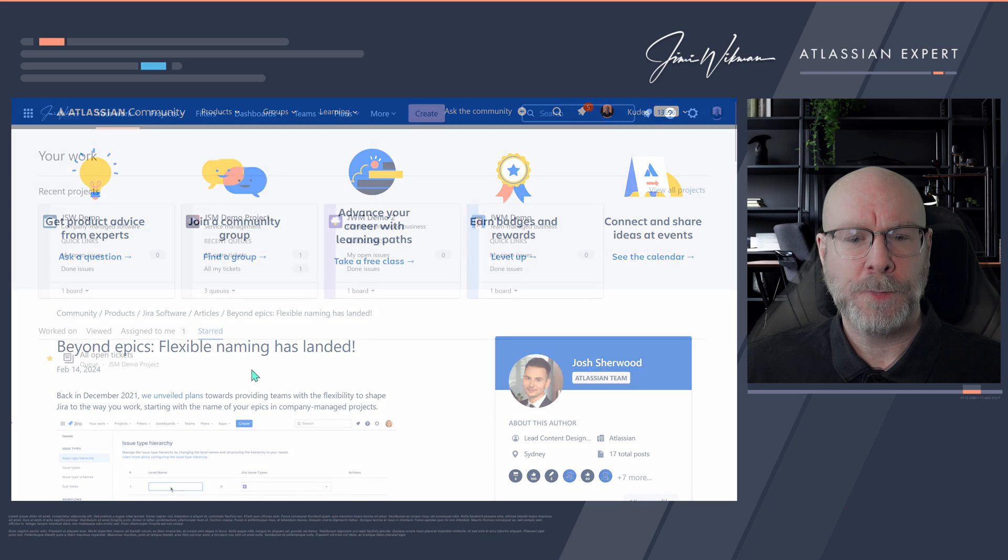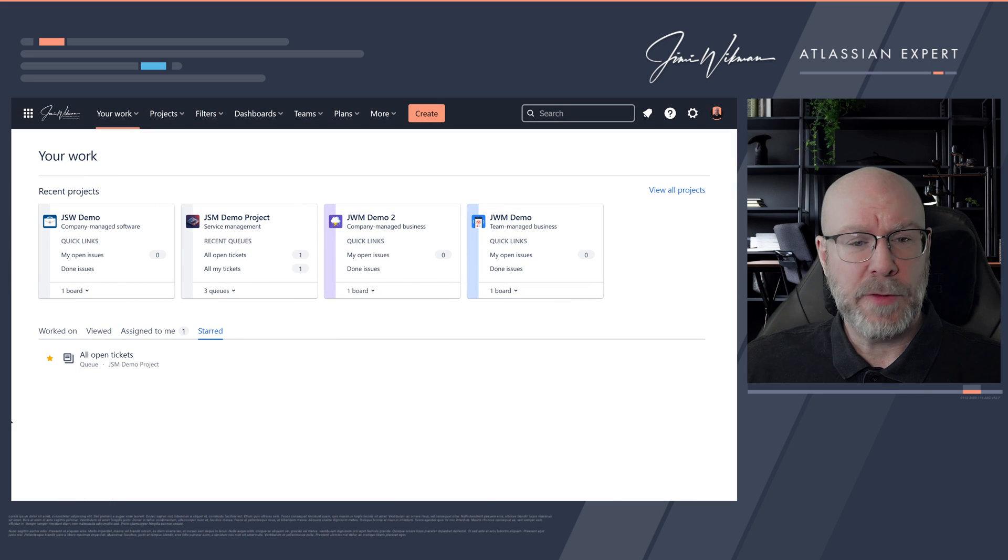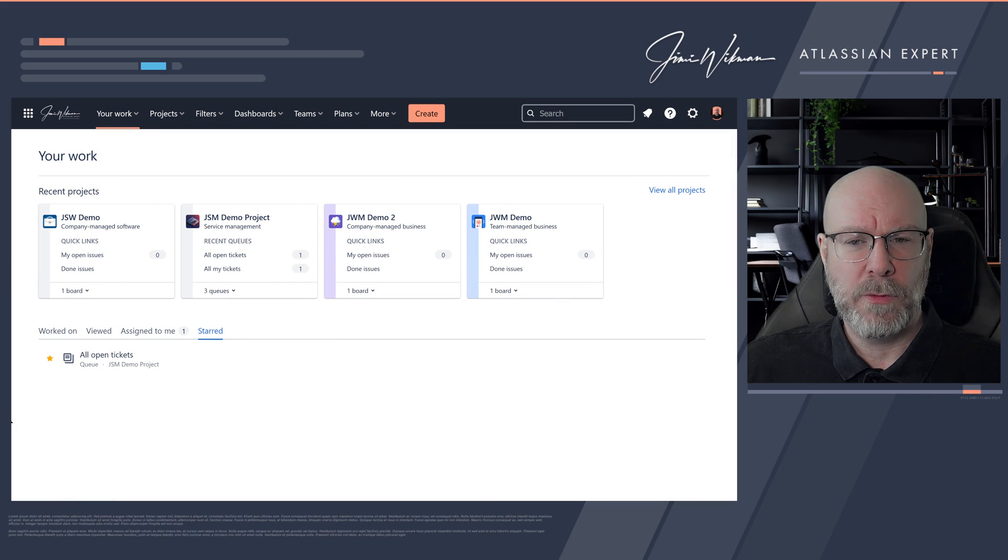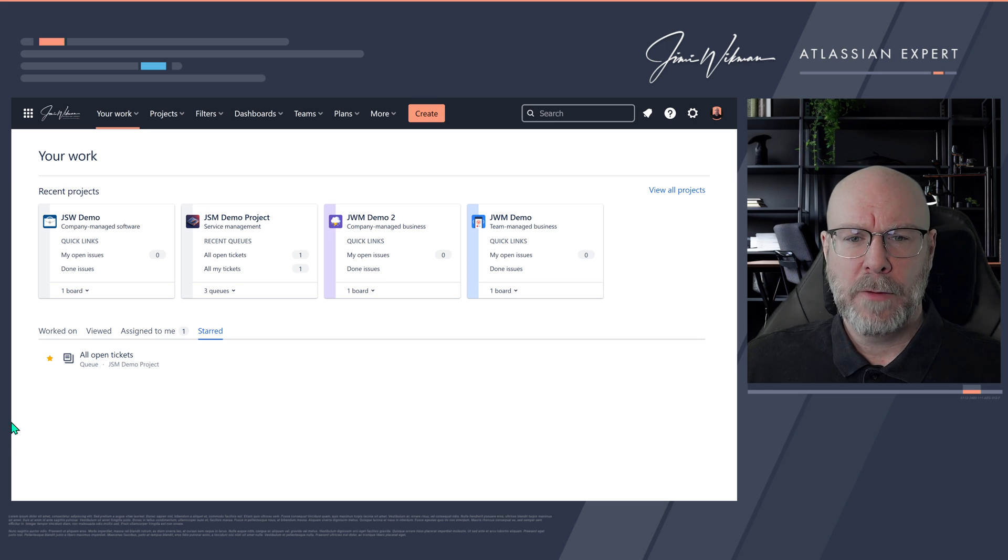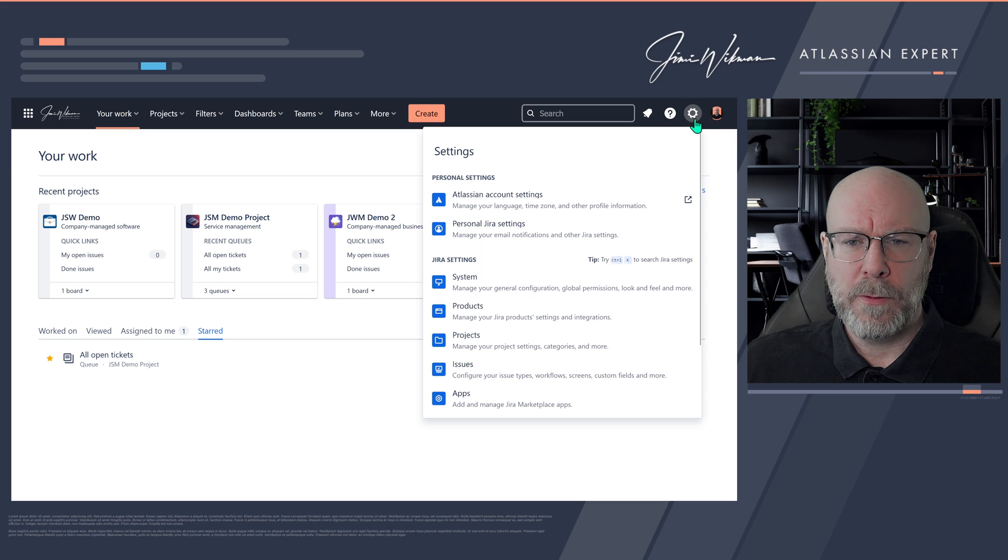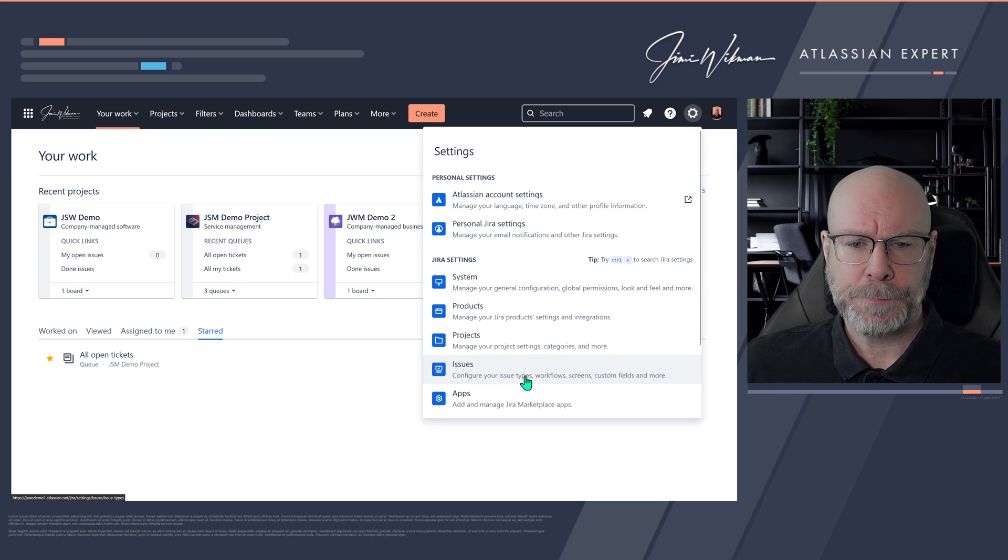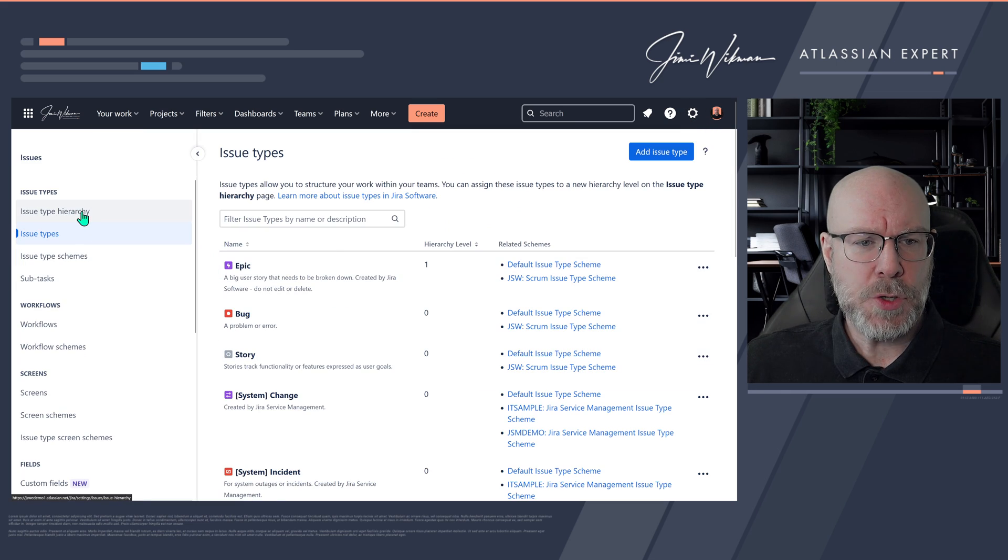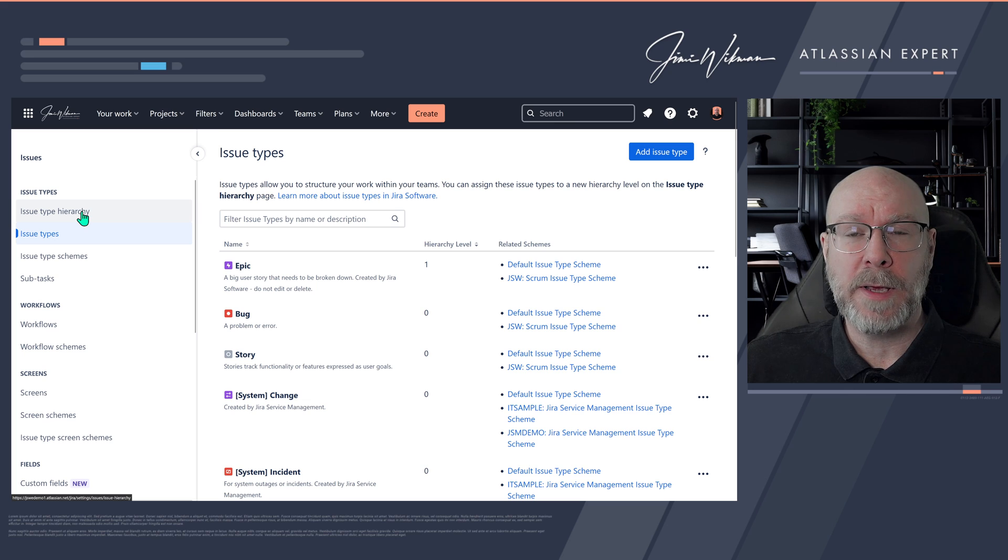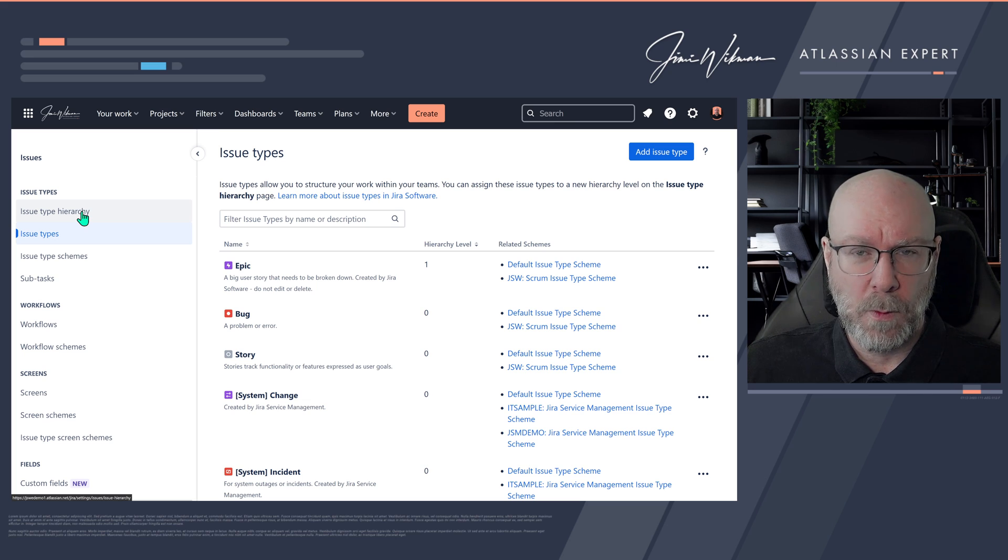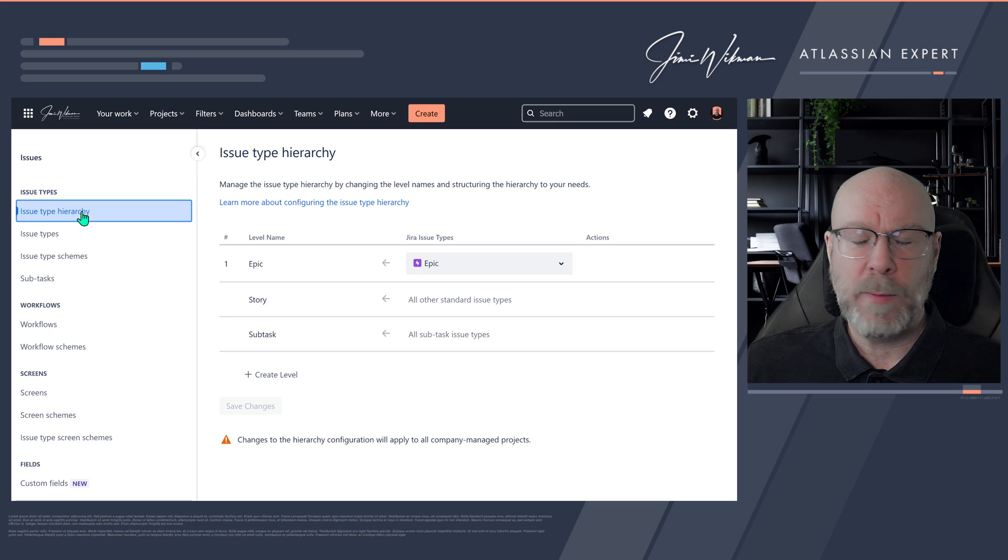So here we are now in my demo Jira. I'm going to show you how to rename this one for your projects or for your instance. The first thing that we do is move over to issues, and then you will see issue type hierarchy. This one is available now for all plans, not just for those of you who have premium and enterprise.